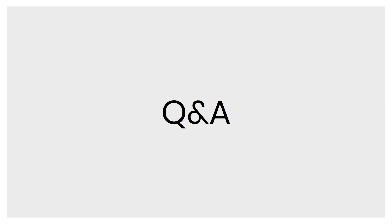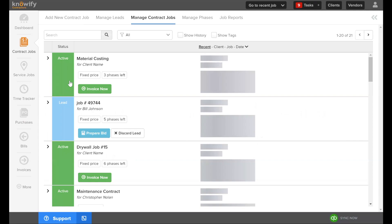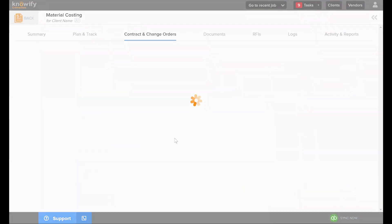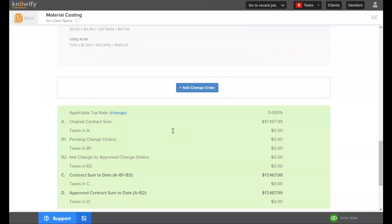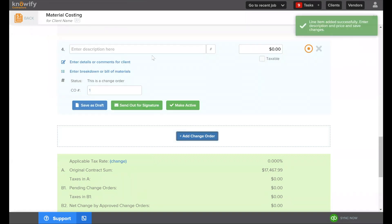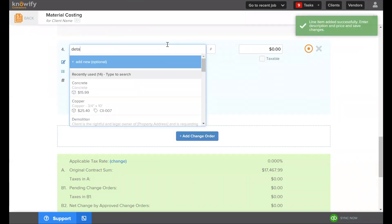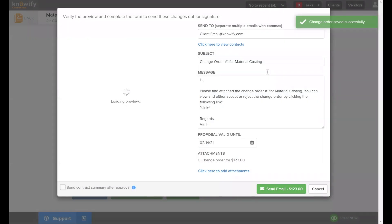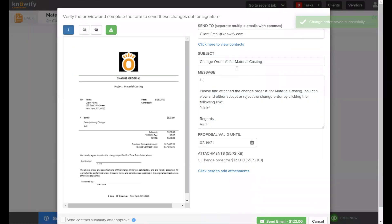Can change orders be sent to the client for approval? Yes. We'll cover this in depth in another webinar, but briefly: when you create a change order, just like with contracts and proposals, you can send it out for a digital e-signature. You can provide the level of detail and notes needed, then send for signature. Change orders can be sent to the client for approval, and we have a dedicated webinar topic covering change order features.